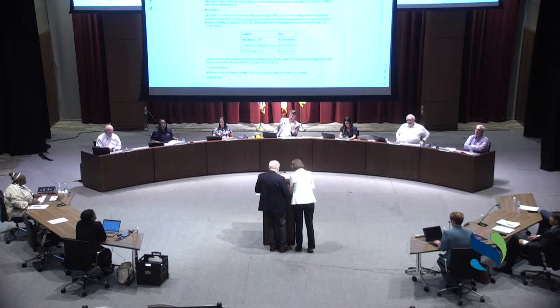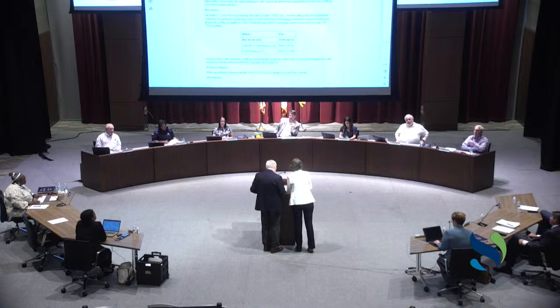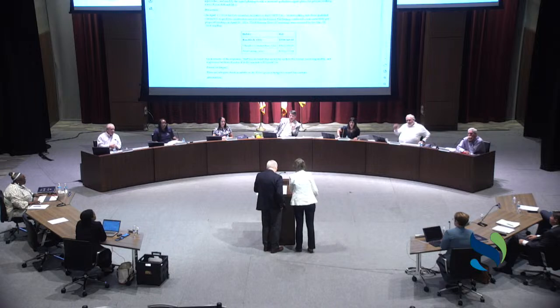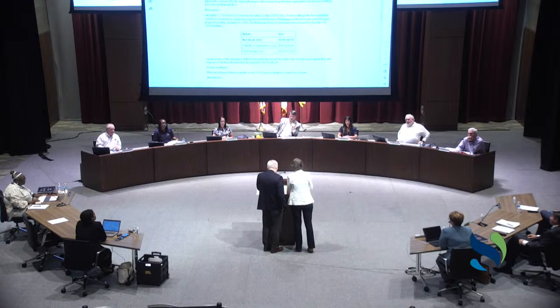Let me just comment that our experience with these materials for signals really hasn't recovered from those supply chain issues during COVID. Quite frankly, it's 6 to 9 months for some of our materials, and some even longer. We just recently, as an example, ordered a pole base to repair something that was hit on one of our decorative pole bases, and it was, I think, close to 10 months for delivery, just for a base.